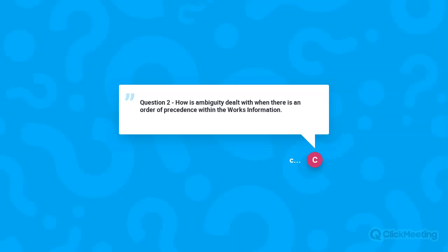If the contract takes precedence over the works information, then the usual standard clause that says the contractor doesn't take the risk, the contractor gets paid for any ambiguity, takes precedence over your works information clause dealing with precedence. So hopefully you've understood that, Chris, but hopefully it also shows what a muddle you can get into by tinkering with the NEC form of contract.